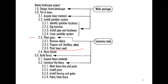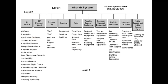Looking at macro-level activities, we create a network diagram using those high-level activities, then we could have a more micro-level schedule looking at level two and level three activities. Work Breakdown Structures can look similar to organograms — defining the key work package and then the various sub-tasks involved in it.